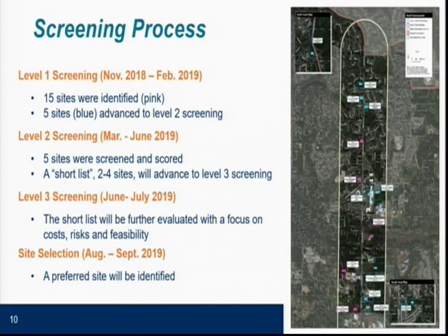So a little bit about our screening process. In Sound Transit lingo, we often refer to our site screening in phases, phase 1, 2, and 3. So I just want to go over what each phase is exactly. Last fall, we started our screening and we worked with the city to identify sites in our project area boundary. We found about 15 sites to analyze.